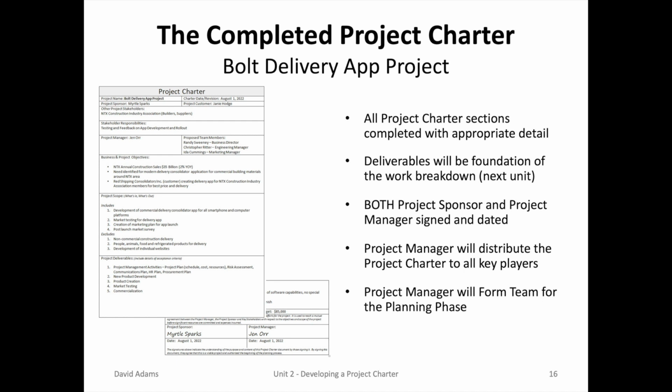So for the Bolt Delivery App Project, Jen Orr, the project manager, completed the project charter and got the project sponsor to sign off. The deliverables will be the foundation for the work breakdown structure in the next unit. It is at this point the project manager will distribute the project charter to all the key players and stakeholders. He will form the project team and begin the planning phase.